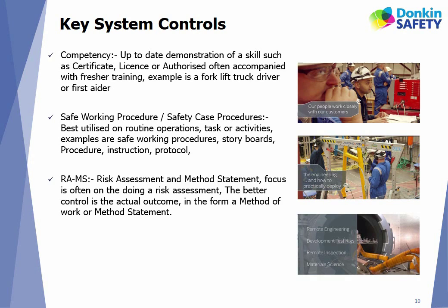RAMs. Risk assessment. We don't often talk about method statements. That is a full description of the work activity, including manpower, equipment, materials, and the sequence of work.